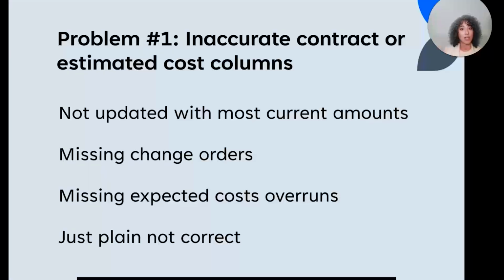Sometimes we'll have the cost already incurred, and then it's not in your contract, and so what that is going to do is pull down your gross profit. If I had to give any advice here, I'd say keep it the same. So if you've incurred the cost, go ahead and put the change order in so you keep the job running the same, unless, of course, you had the cost and you're not going to get paid for it. Well, then that sucks. But that one you won't get a change order for, so you wouldn't be putting it in. Hope that makes sense.